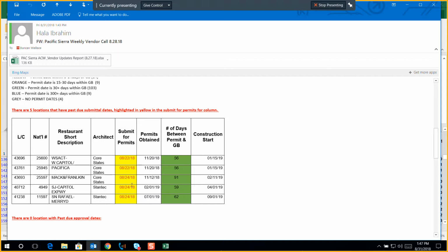So don't make us show like we're late, because they take that deadline, they build the construction date based on it. They start talking to owner operators, and they make them start preparing everything to ground break. If you don't have permits, you can't start, and then not good. Yeah.